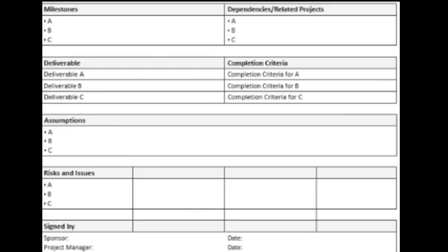And the milestone is that in 7 days, you are going to complete that particular deliverable. The completion criteria is that you will have the foundation done to the DPC level. And now, because the materials have not arrived, you have not even started and 3 days is gone. So one of the things you could be assuming is that the materials for that milestone will be made available.